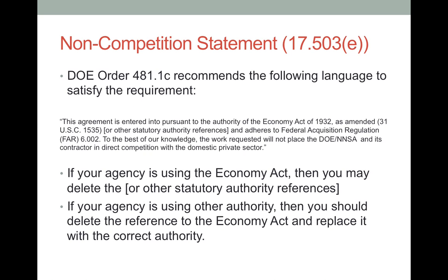DOE has created template language to satisfy the requirement of FAR 17.503(e). Using this language verbatim is not required, but it makes the search for the statement by the DOE signing official much easier. If you copy and paste a statement from the DOE order, you only need to check and remove the unneeded authority referenced. The requesting agency should have some documentation to support the statement in their file.